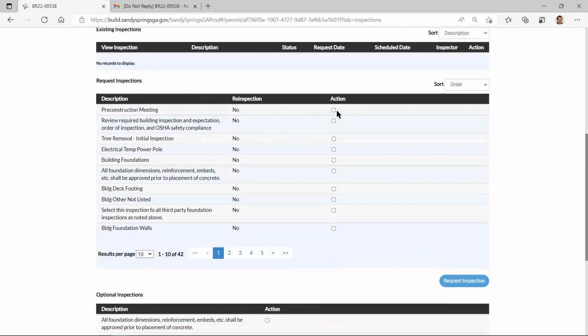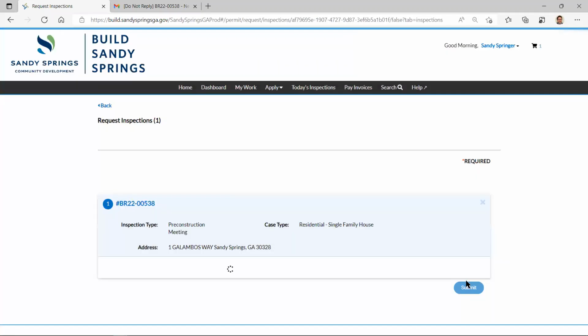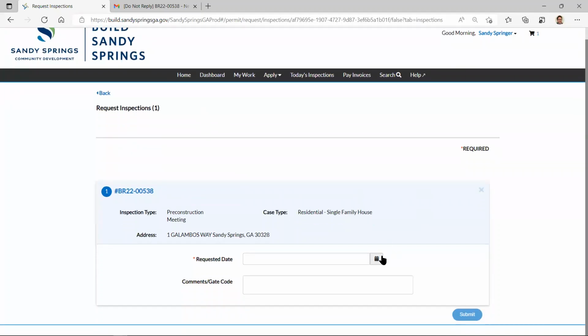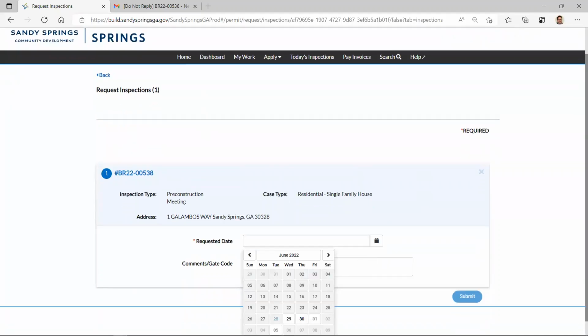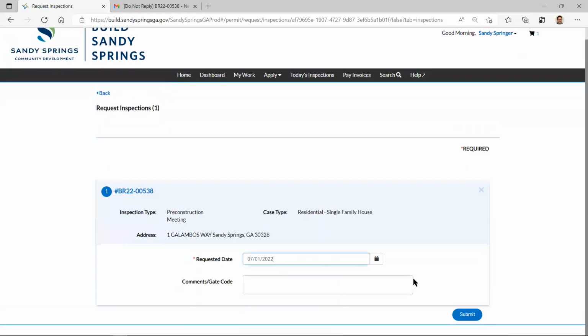So the first inspection you always have to request is your pre-construction meeting. All right, all you have to do is title it. All right, I select it and then say request inspection. And now it comes up to request a date. So what date do you want this on? Let's say we want it Friday.